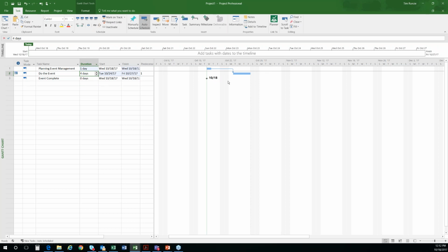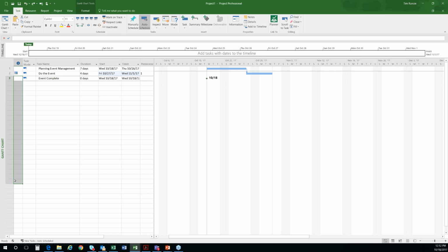And so what's common is a lot of people will hard code their dates and things just won't move. They won't accurately progress, they won't update, and it's also another source of frustration that the schedule is supposed to be dynamic. The whole idea is that if this symbol here is all the way down the left-hand side, you might as well be using Excel because you've hard-coded all your dates. And while yes, we might be sitting on top of a relational database that gives us charts and graphs and timelines and dashboards, you still are going to struggle in your scheduling pieces.